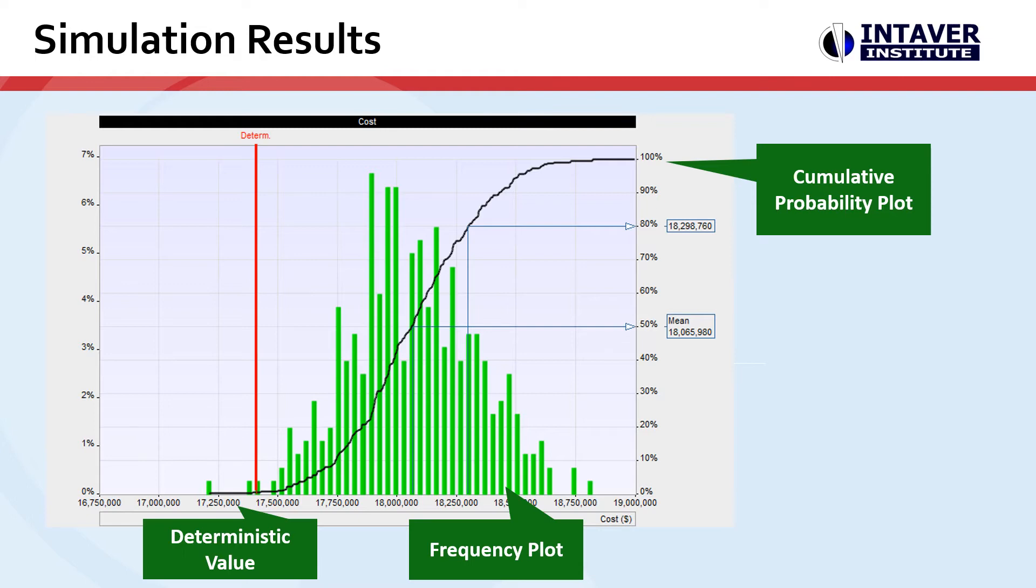A common view is a combined frequency and cumulative probability plot. This shows us the original schedule versus various confidence levels.